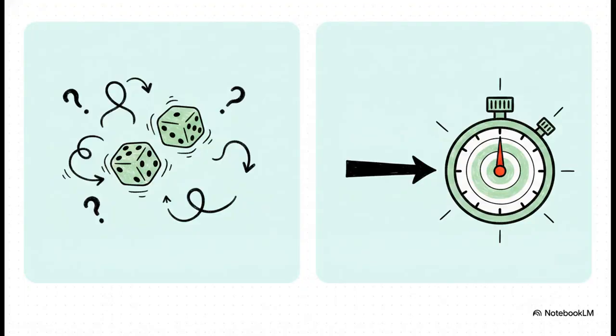Now, what's really interesting is the contrast between PERT and another really popular tool you might know, CPM, or Critical Path Method. They're often used together, but they have completely, fundamentally different worldviews. You see, CPM assumes deterministic times. That means fixed, guaranteed durations. You use CPM when you know exactly how long a task is going to take. PERT, on the other hand, totally embraces probability. It deals with uncertainty by using probabilistic time estimates when you just don't have that fixed guarantee.